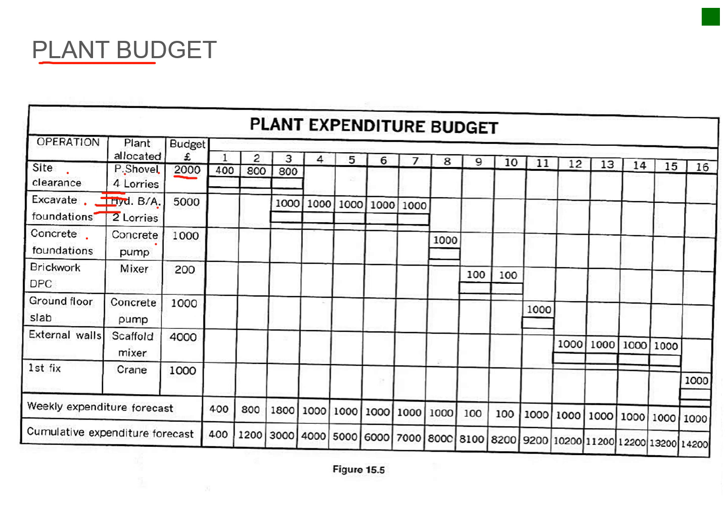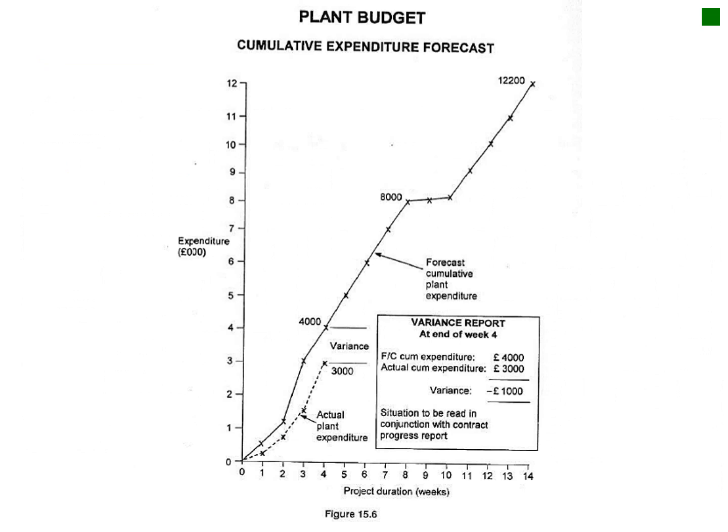In this case it's pounds, but let's say it's 2,000 rand, divided in week 1, week 2, week 3, and then you add that and you get your cumulative cost again, like we did in the previous lecture. Okay, and then you plot that again, and you can actually calculate your variance to that.